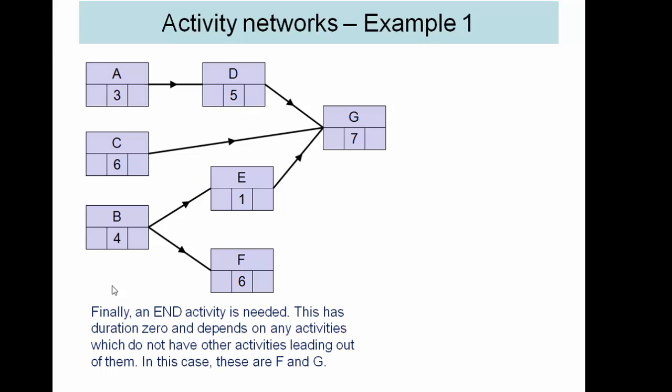As we've now finished we now need an end activity because F and G are both at the end of the project so we place the end node there and this now enables us to find out how long the project will take.